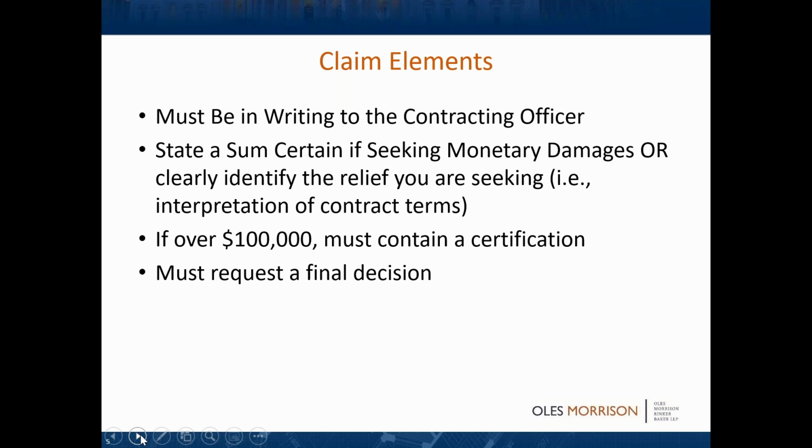Very, very, very important. Now, I'm sure a lot of you have heard of the construction company Kiewit. Well, they had a case that was decided by the Federal Circuit, which is sort of the Supreme Court of government contract law. And the Federal Circuit held that a certified claim for constructive change was valid where the claim referenced back to a prior REA. The court found that the claim does not need to be issued in any particular form or wording as long as the CO clearly had adequate notice of the basis and amount of the claim and issued a final decision as it did there.